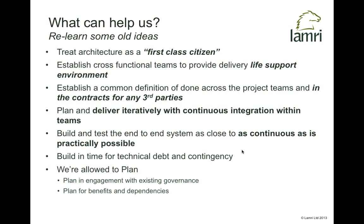Planning is not anathema to an agile project. We can plan engagement with existing governance, and work out how we're going to do this. We can plan for benefits and dependencies — when are we actually going to deliver particular benefits, and at which point do dependencies become critical and lock in? This will change over time as we become more experienced. But there's nothing wrong with having, relatively early in the project, a vision of when key features are delivered and when key dependencies lock together to enable those features.